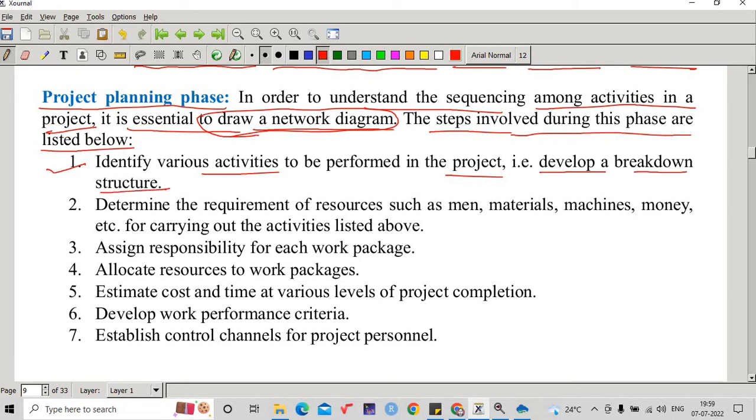So for any activity, we have to identify this breakdown structure: which activity we are going to initiate first, and which activity is going to happen after that. Suppose the first activity we are initiating, after that the second and third activities are initiated. So the first activity is essential to perform the next two activities. Again, a certain further activity can be involved after this activity too, which is named, say, 4. Then the third activity might not be essential to complete the fourth activity.